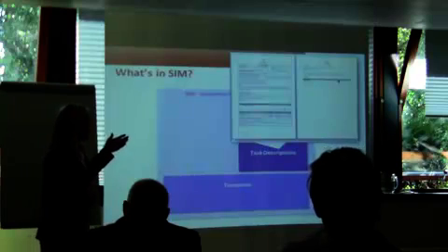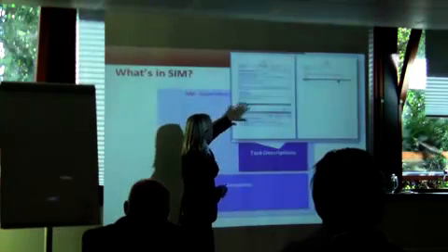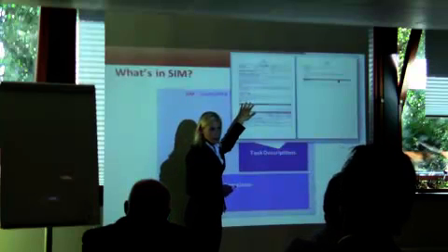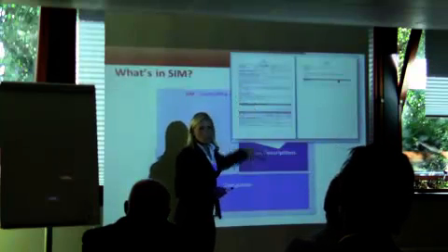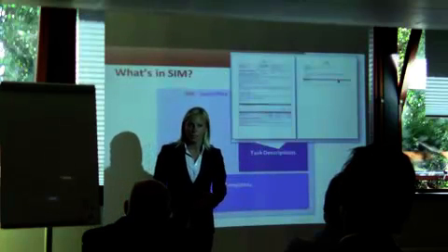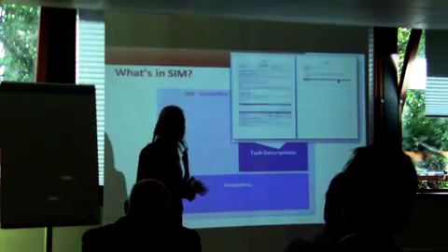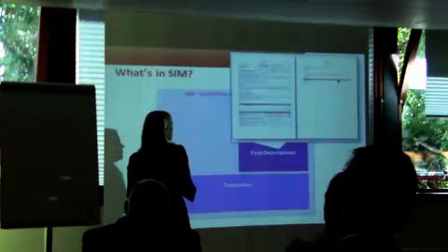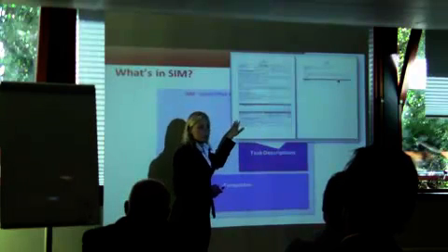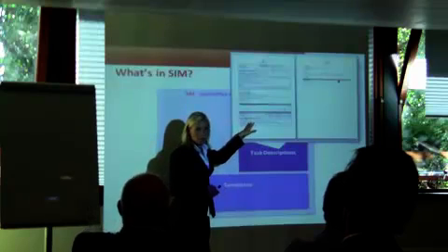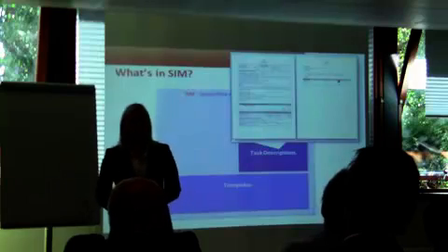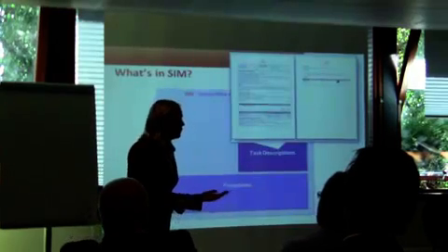And the content or the format is that you have stated at the top the things that the customer should prepare. And you also have a short description of what the consultant will deliver. So no questions or misunderstandings there. The customer should know what to prepare, and they should also know what we are there for, or what we should do. And then we also have some general items: the price and the estimated time, and the general agreements like traveling costs and working after office hours, etc.